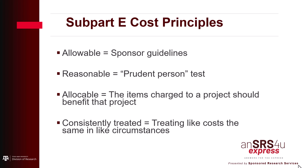The tests for allowability of cost under Subpart E cost principles are: costs must be reasonable, applicable to the sponsor agreements, and given consistent treatment appropriate to the circumstances. They must also conform to any limitations or exclusions set forth in these principles or in the sponsor agreement. A cost is reasonable if in its nature or amount it does not exceed that which would be incurred by a prudent person under the circumstances prevailing at the time the decision was made to incur the cost. Allocable costs must be assignable to the project in a reasonable and realistic proportion that directly benefits a sponsored research award.